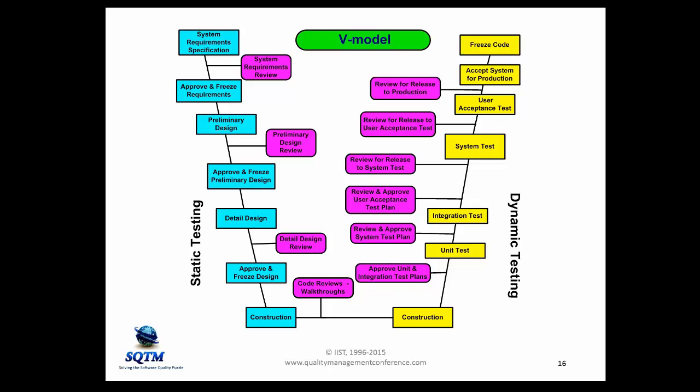They see how many defects were found, how many were cleared, and whether the team that's developing the requirements has signed off. Is everything ready to go? And if it is, they submit a report to the reviewers, and the reviewers say, okay, and they sign off. So that's another step, but it's a step that needs to be performed, and quality assurance does it.